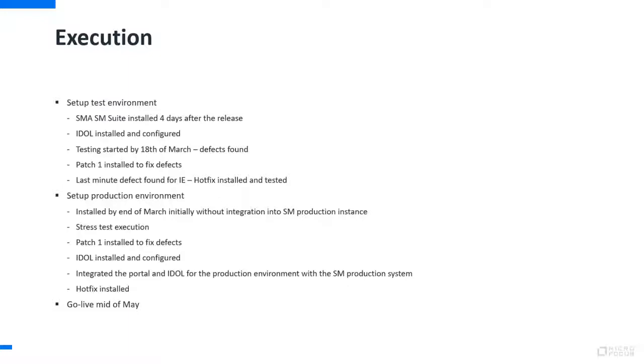But then close to go live, we found a last minute defect which happened only in Internet Explorer. And to not block the go live, R&D luckily provided a hotfix we could easily reproduce, and so we provided on a very quick turnaround a hotfix to the customer, installed it, and it worked, and the customer could go live as planned.